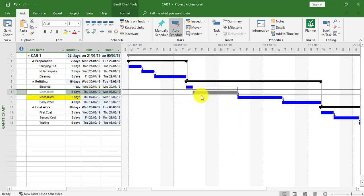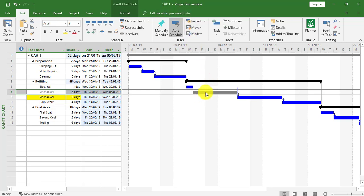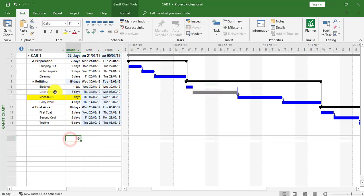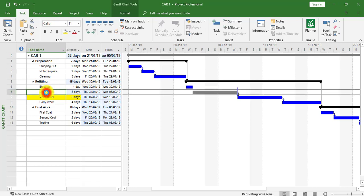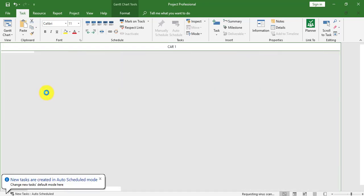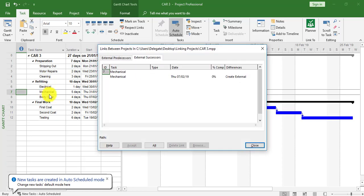This means an external task link has now been created to Car 3. I can open up Car 3 by actually following the grayed out task which is just above the yellow shaded task. I'm going to double-click the grayed out mechanical task, which is the external task.